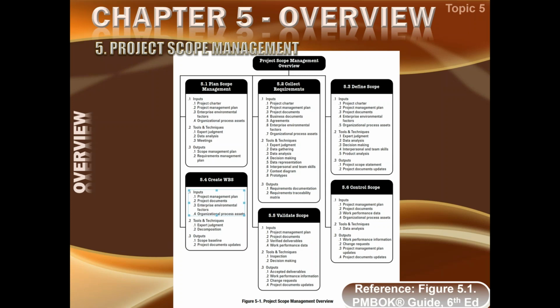These requirements are not even the scope as yet. These are just the desires, needs, and expectations of the stakeholders, and we may decide not to do some of these requirements. We may not fulfill some of them. We will negotiate with the stakeholder and say, well, this is not in the scope of the project, why are you forcing us to do that? Ultimately, many requirements will be dropped out. What has to be done is the product scope, which will be established in the define scope process.